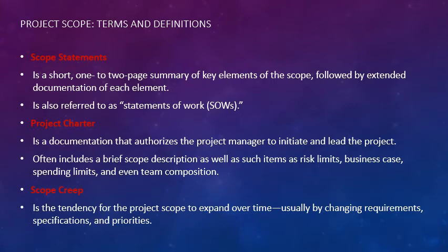Project scope, terms and definitions. So scope statement is a short 1 or 2 page summary of the key elements of scope, followed by an extended documentation of each element. This is also referred to as a statement of work.